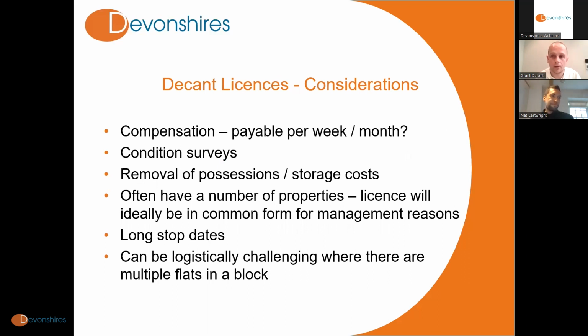First of all, compensation: whether it's going to be payable per week, per month, how long it's going to be payable for, whether it's just going to be a flat fixed sum. Also, given that these are people's flats, you will need to reinstate them to their existing condition, and how that is documented.